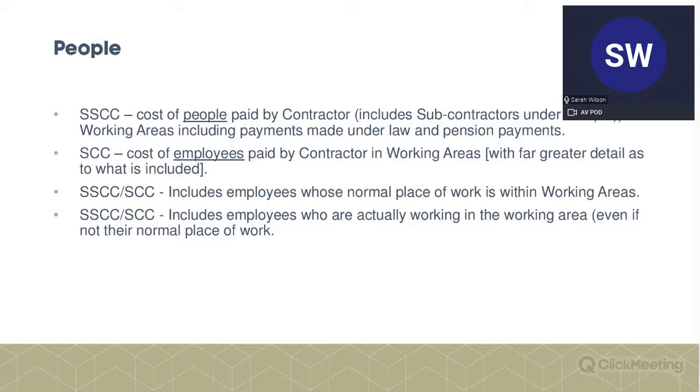So, just to give you an idea, we've covered some of them. It also covers your overtime, fairly obvious, I think, and bonuses and incentives, again, fairly obvious. One of them is working in special circumstances. It covers absence due to sickness and holidays. It also includes payments made in relation to people for things like travel, board and lodging if you're having to work away, medicals, your death in service benefits. So there's all sorts of things.